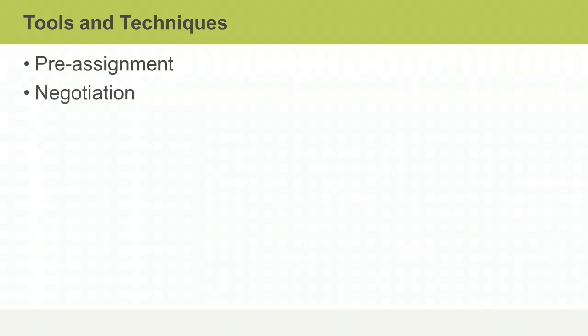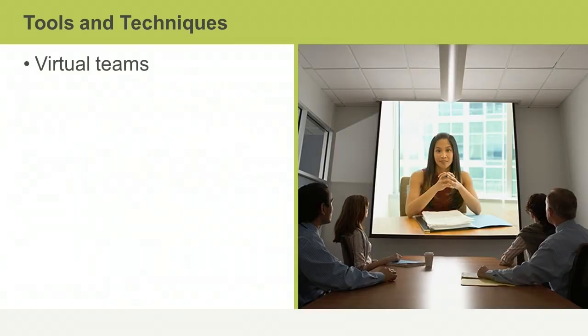You may need to persuade internal functional managers or managers of other projects to release people for your project team. You may also need to persuade external organizations to provide resources on a contractual basis. These negotiations hinge on the availability and skills of the resources. If the project team members you need aren't available from the pool of existing employees in your organization, or aren't all available at a particular location, you can set up virtual teams or use acquisition to contract staff from third-party organizations.